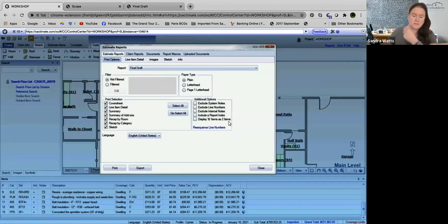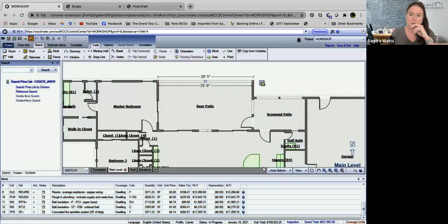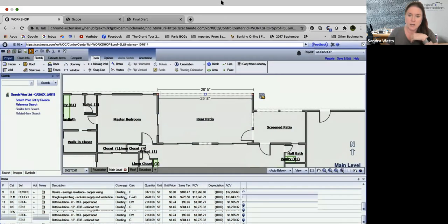Also, don't let your adjuster tell you that architectural and engineering and things like that, or they call them soft costs, are only paid as incurred, because that's not true. Hopefully Nationwide's done with that. They were explained, but those are all part of the rebuild cost of your home and should be included in the regular. Also permits. That gets into code upgrades.